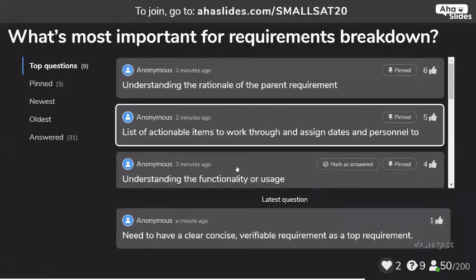That can be really important because certain items, especially when you go into testing like single event effects, the complications of testing more complicated parts like processors and FPGAs may require that you not only reach into your personnel, but to effectively do it, you also grab people from the company who are going to use those parts. So you're having mature conversations about what's going to be going on within the designs and what primitives are of particular concern.